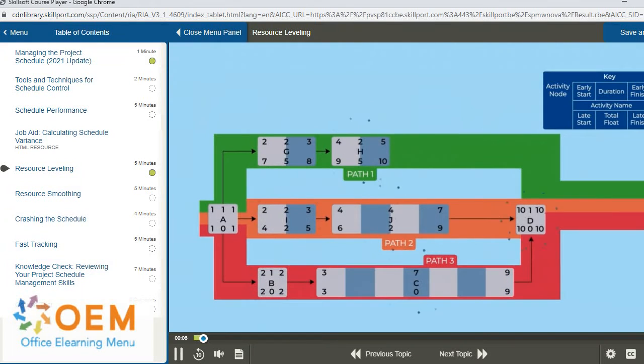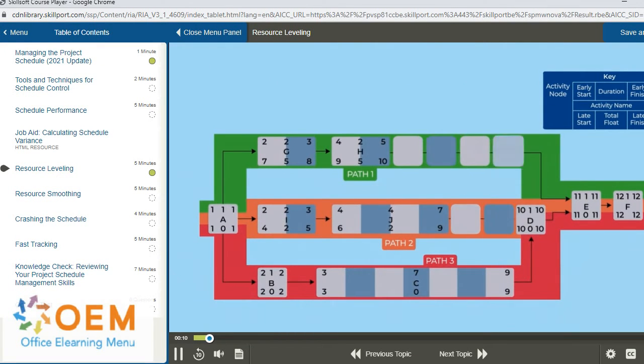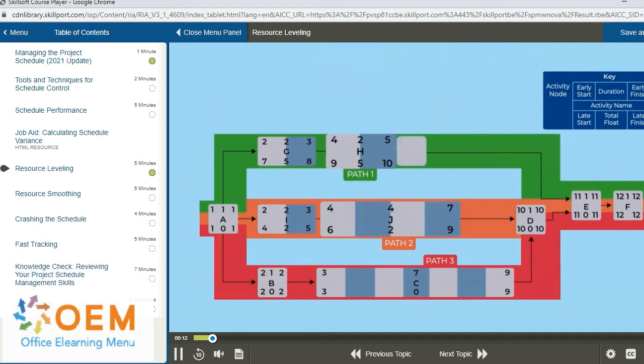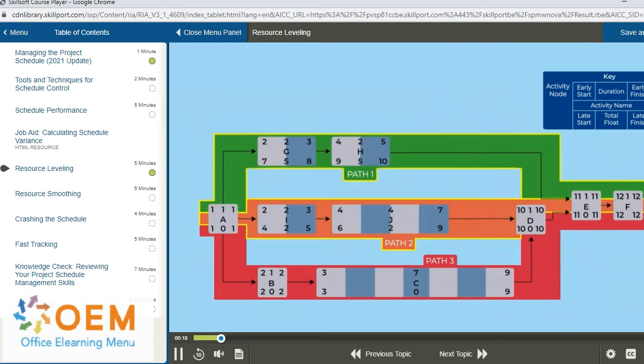Develop our project schedule, we perform a forward pass and a backward pass to determine where we have flexibility in our schedule. The primary goal is to protect the activities on the critical path. Identifying free float in non-critical path activities helps us to identify the activities which can lend flexibility in order to meet the critical path deadlines.